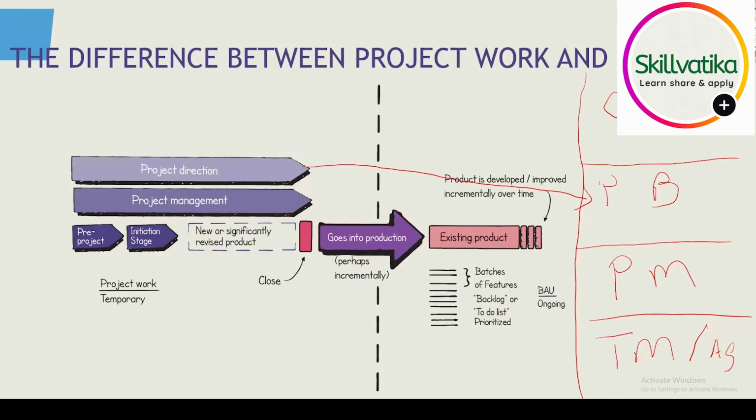The project board is what is going to give you project direction. The project management is going to be provided by you, the project manager. And the work that is being executed and performed on a day-to-day basis is the team manager / the agile team. Above the project board, we have corporate. So, Daniel, picking on you already.